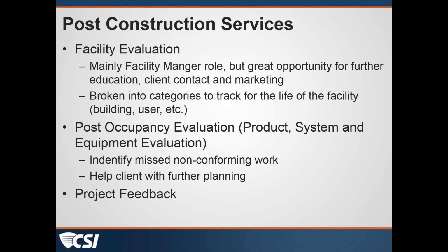If you've got a punch list and you say, okay, you're going to be done in 45 days, if you're not done in 45 days, then liquidated damages at a lesser amount than for substantial completion kicks in. So as a method to keep the contractors and subcontractors motivated to get the job done. So that's all I've got.